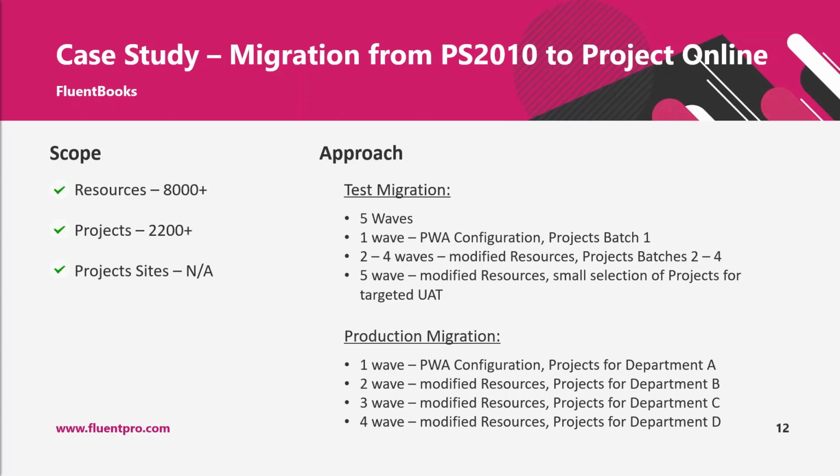So why do we need to migrate modified resources? In the source environment, Project Server 2010, users submit timesheets with their actuals for projects, and users also submit administrative time like sick leave and vacation, and this time is added to users' calendar exceptions as non-working days.